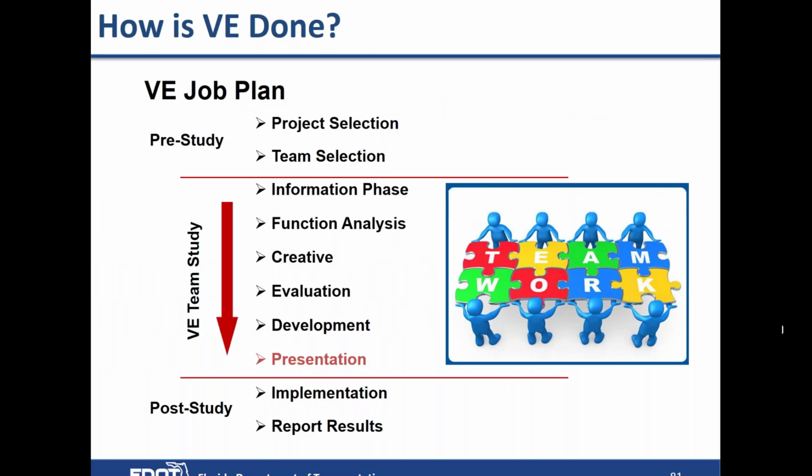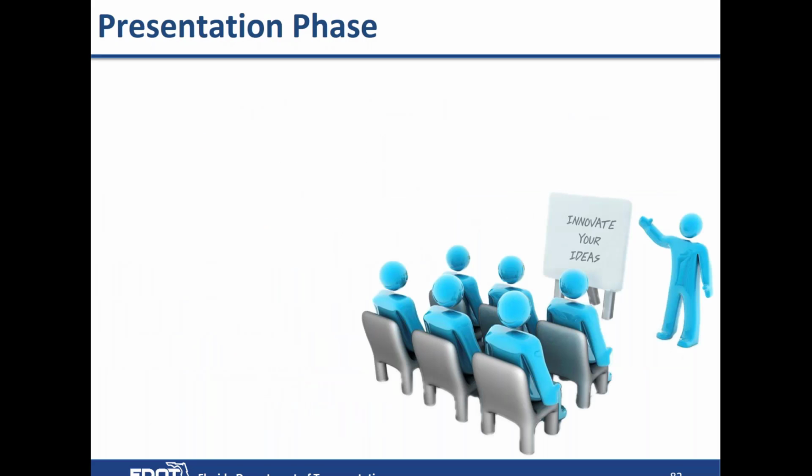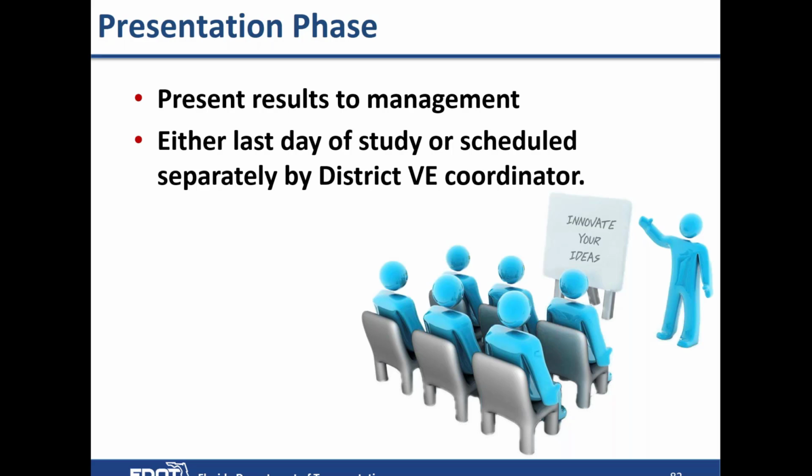So, presentation. The next phase of the process is when you present the results to management. It's typically done on the last day of the VE study, typically on a Friday, typically a late Friday morning. But we have also had them scheduled separately by the district VE coordinator when they can get all the decision makers available. The decision makers may not be available on the last day of the study, and they want to make sure that they have the people who need to make decisions on these available for the presentation.